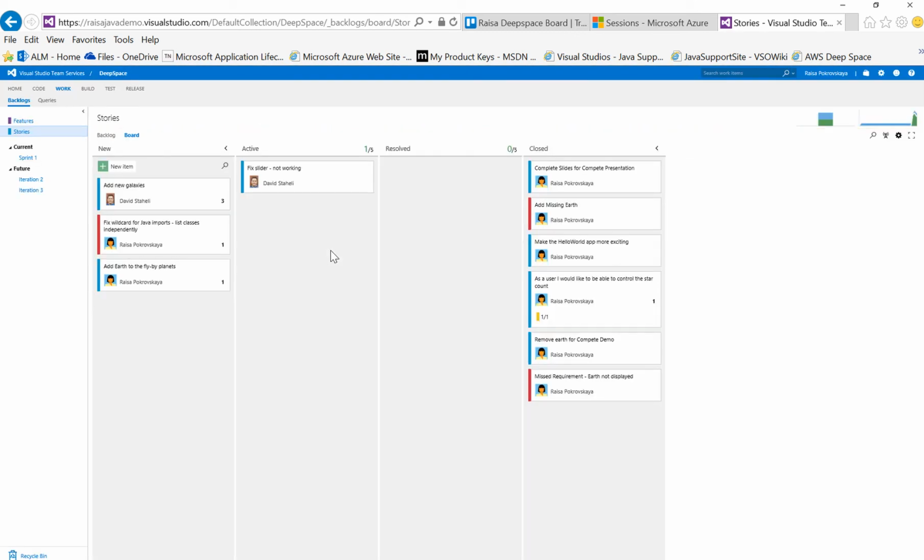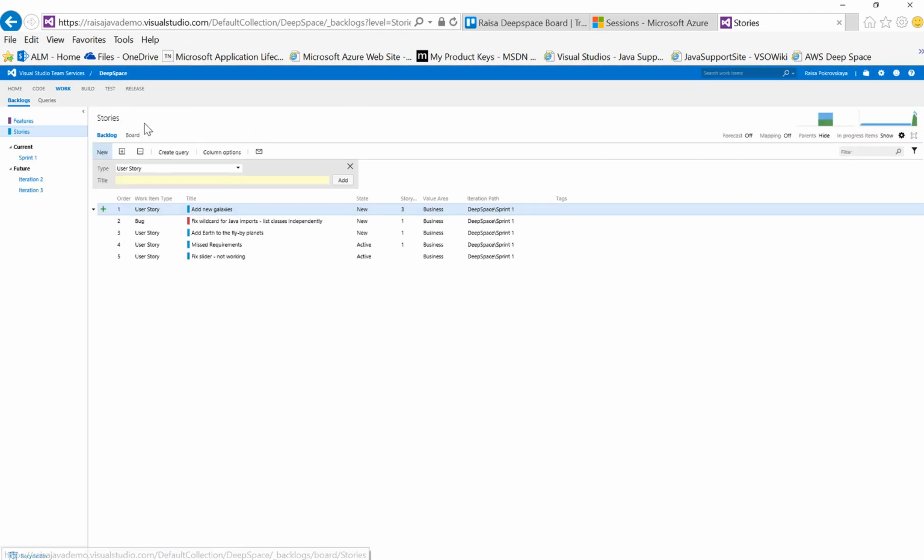You can go to the work section. The work section is your Agile planning section. So this is where you track your stories, your tasks, your backlog, and bugs. Here I have a Kanban board configured to not only show me the tasks, but also to show me bugs. That's the feature I have turned on so that I can see bugs with my tasks. And I can see here that I have 2 things I need to go do today. You can also look at it in a backlog mode for more the Scrum type planning. But I'm going to use this Kanban board today.